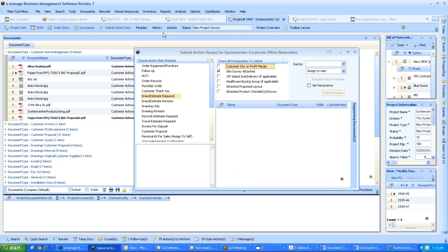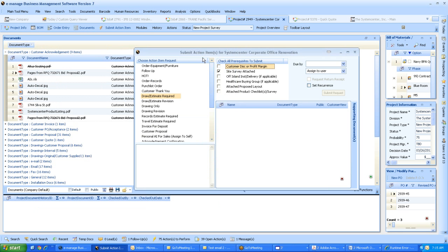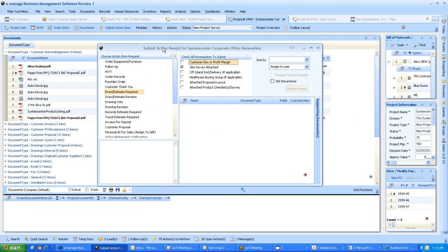If you go into our mail merge surveys, we have a site survey form that they print up, and it has things like who's the contact, do you require elevator reservations, what's the size of the elevator, is there a loading dock, all the general information. So they need to attach that.